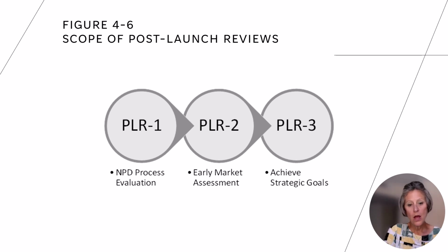Gate criteria are presented as a checklist for the gatekeepers to complete on an individual basis or as a group, as in Figure 3-3. If the gatekeepers all agree that the gate criteria are met, including deliverables and resource plans for the next stage of development work, then the project will advance to the next stage. The project is given a go decision.